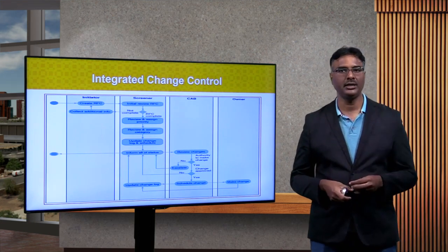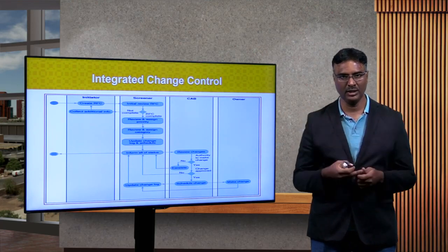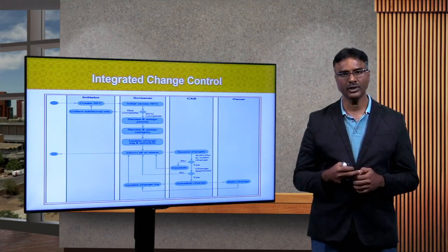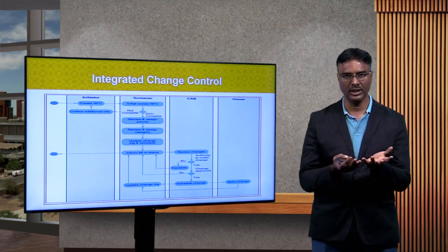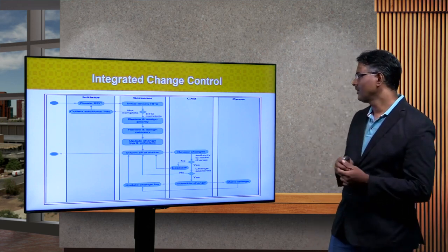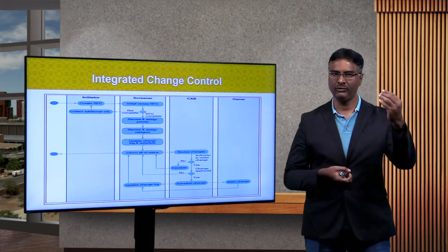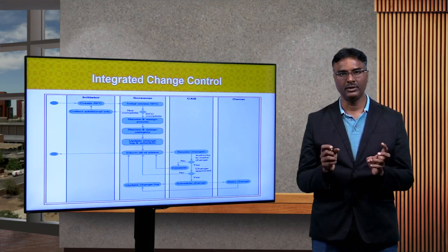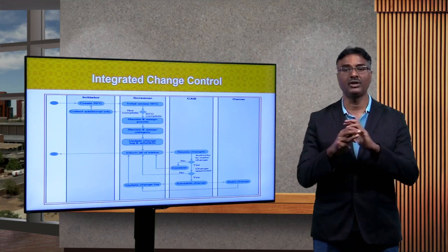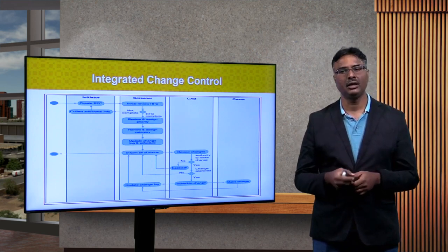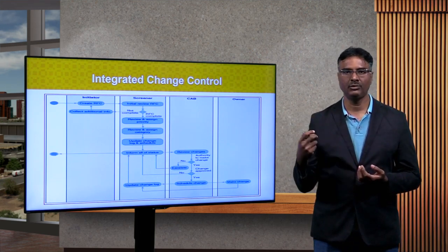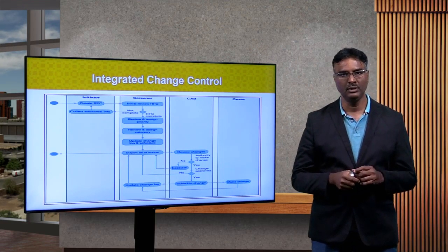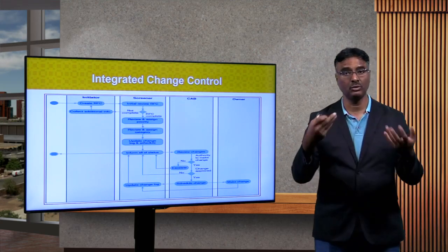So they could also assign a priority, because not all changes will be of the same priority. Could have high, medium, low, based on the categories that you have decided. So once the review team prepares all this documentation about the change, then it will come to the CAB. So the CAB will meet, and then they'll review all the RFCs along with the impact analysis, and then they will make the decision. Remember, it's only making the decision, it's not approval for all changes. It could be that after reviewing the impact analysis for a change, the CAB could decide and the chair of the CAB can say this change is rejected. So that's possible. But you always have a documentation and a process to go through that.